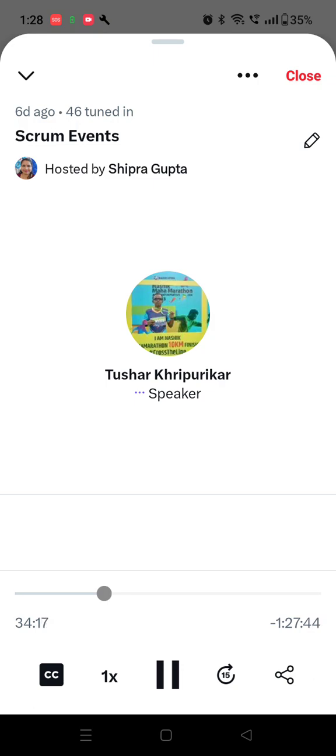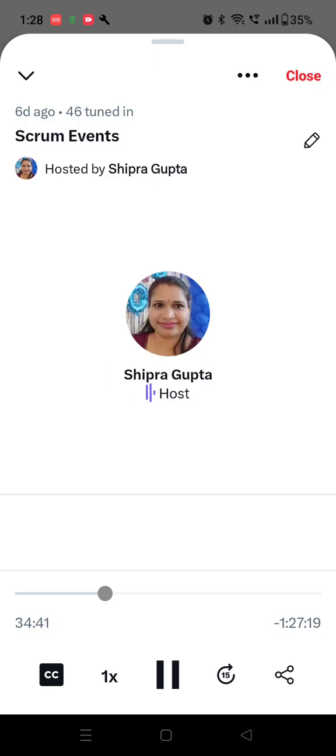So what I suggested was that it is done on the first day of the sprint. It is recommended that for a 1 month sprint, minimum 8 hours should be spent on planning. So if you are having a 2 week sprint, roughly 4 hours, that is half a day. So the first half of the first day is supposed to be a sprint planning session, wherein you pick up all the items in the product backlog which are ready, and you pick up the items which satisfy the sprint goal, right? And then you bring those in.